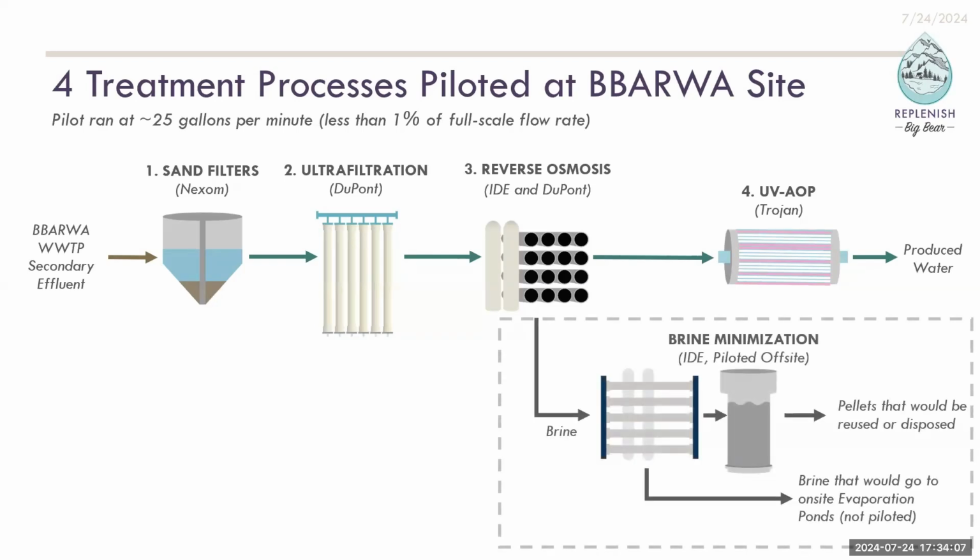And then lastly, we had brine minimization, which during the first phase was done by IDE. We had to pilot that off-site. The cost of doing it on-site was almost twice as much as sending the brine to IDE's research and development facilities to have them test that there.